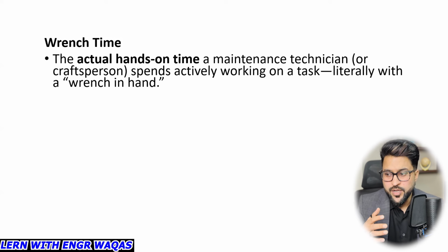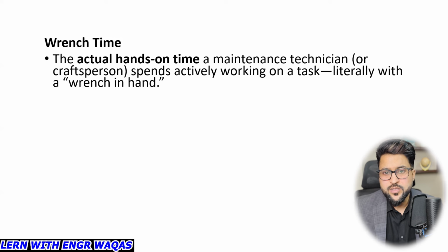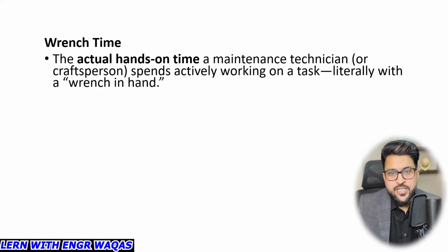They might be going out for washroom, for dinner, for breakfast, or for any intermittent break. So that is not included in wrench time. Wrench time is the pure time which they are going to spend on overhauling of that valve, holding that wrench, and spending time on that maintenance. So that is called wrench time.